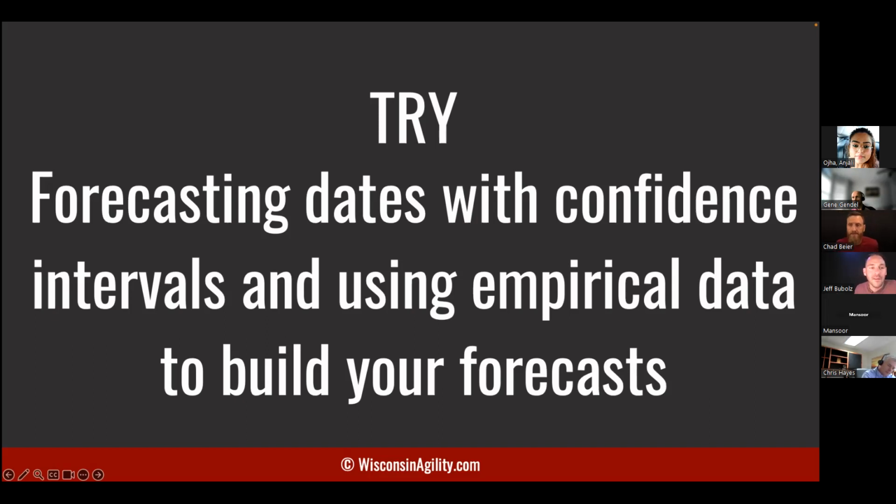But oftentimes we give the 50-50 date as the best date, or the date where we're being held to, without knowing what our odds are. And we can track that date as we're making progress toward it and say, is the confidence level getting higher or lower with empirical data? As we build, we're going to get closer and closer to that date, and we're going to know, are we going to hit it or not? And we're going to be able to adjust. So the forecasting can be a very useful tool to help drive your plans as a product owner.